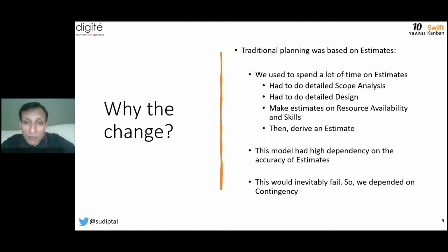It was a game of luck to hope everything goes right as planned, because that was hardly to be expected. Most leadership and management accepted that that would not be the case, and so they would tolerate a level of contingency. If it was a low risk project, they would accept a low level of contingency. If it was a high risk project, they would clearly expect a greater level of contingency and would be ready for it.